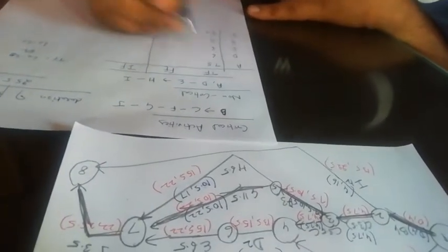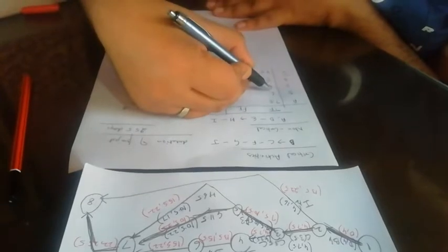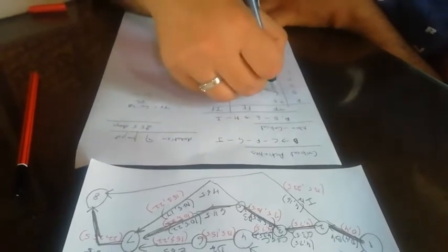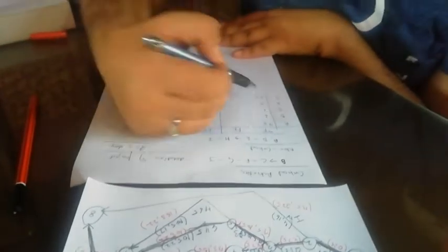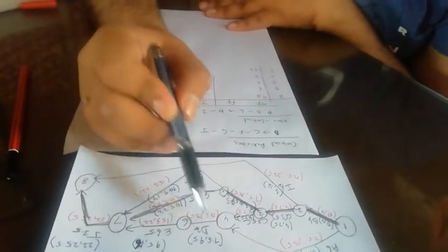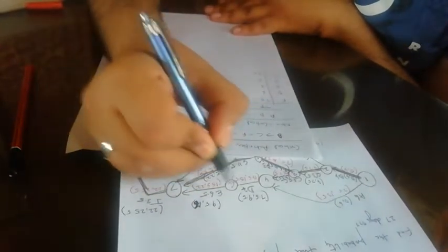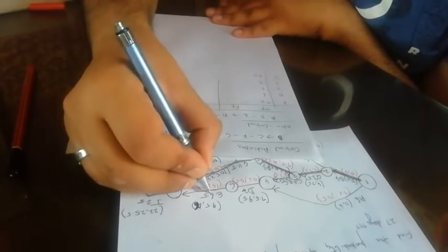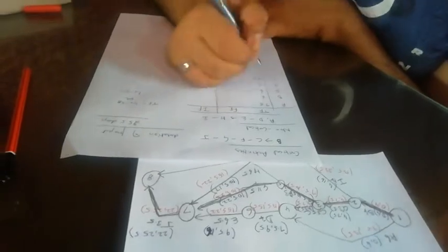So this will be the total float, and you can also check the total float if we can give the delay. The total floats, that if we can give the delay more than this, 6 is the maximum. If we give more than 6, it will affect the overall duration. So if we give the delay of 7 days to this, it becomes plus 7, it becomes 9. So 7.5 plus 9 becomes 16.5. 16.5 plus 6.5 will be 23, which affects the overall duration of the project. So this is the total float.